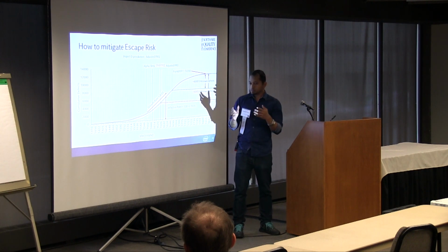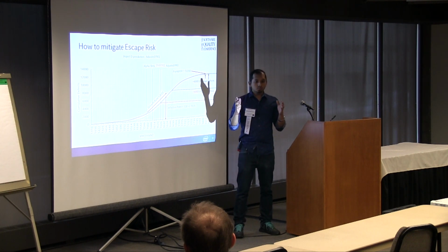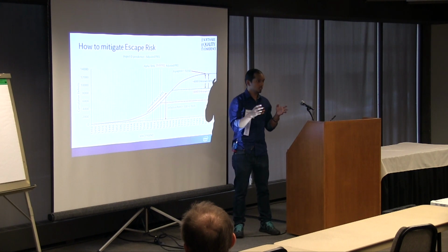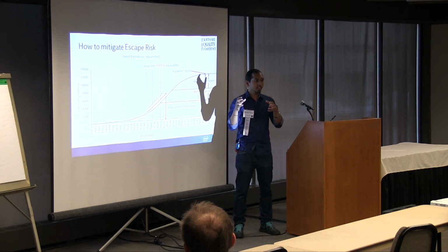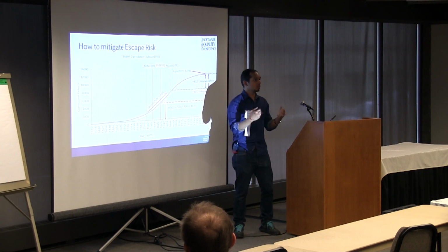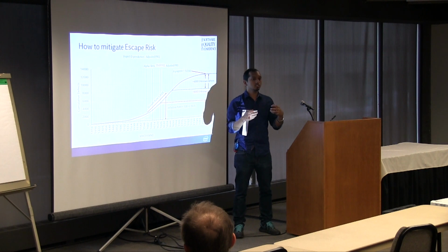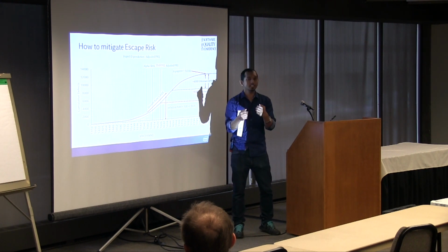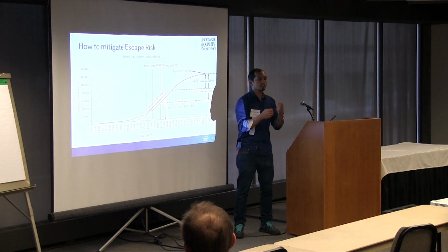You can focus more of the activities in development. What generally happens in a sprint, or at the end of a significant milestone, is that a lot of people tend to focus the last few weeks as validation sprints, where they test a lot of things at random.